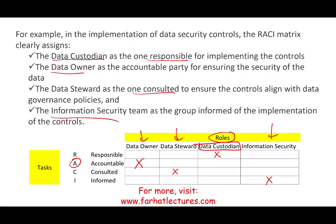You should always have an A — someone accountable — and at least one group marked as R — doing the work. You don't want to have too many Cs everywhere, because if everybody is a C, you're going to go back and forth with so many discussions. There should always be a group that you're going to inform as well.